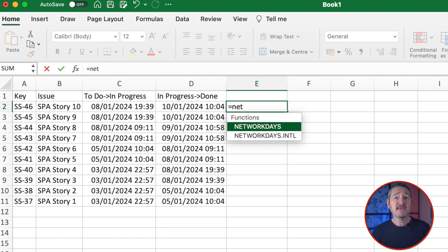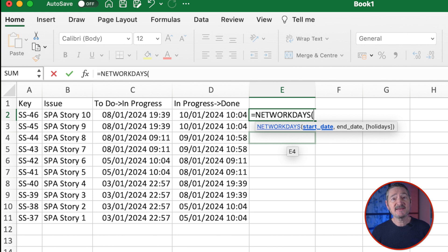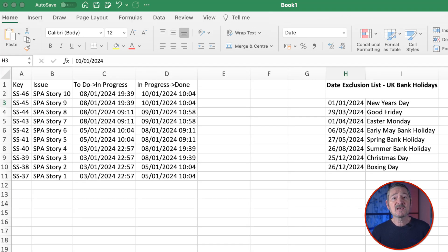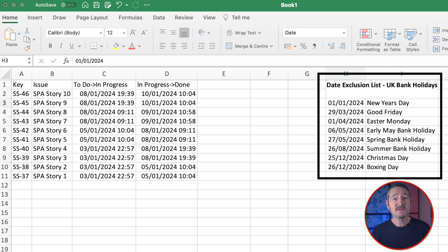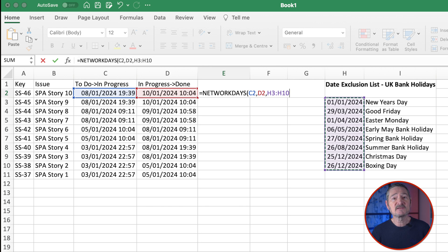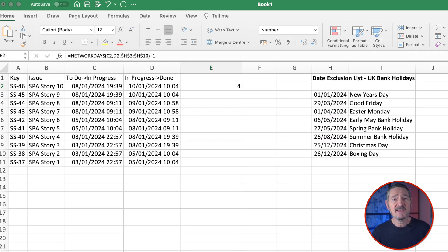What about stories that don't start and end on the same day? For example, if a story starts on the 1st of January and finishes on the 2nd of January, using this calculation the cycle time would be two days — which is a reasonable and realistic outcome. You can do this easily with the Excel function NETWORKDAYS, which automatically excludes weekends. NETWORKDAYS accepts three arguments: a start date, an end date, plus an optional list of exclusion dates that you specify — such as bank holidays. In this example I have a list of all UK bank holidays in 2024. I simply select that range as argument three and they will be excluded from the calculation. I wouldn't remove people's annual leave, as this is normal and will even itself out during the year — but you could, simply by adding those dates to the exclusion list.